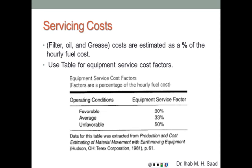Servicing costs — to keep equipment in good condition — include filter, oil, and grease costs, estimated as a percentage of the hourly fuel cost. This depends on the number of hours of operation. A table shows for different operating conditions what the equipment service factor is as a percentage of the hourly fuel cost.